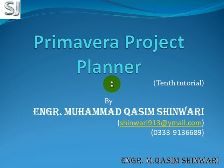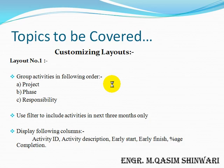Bismillahirrahmanirrahim, Assalamu Alaikum. Welcome to Primavera Project Planner 10th tutorial. I am Engineer Muhammad Kasim Shanwari to guide you. In this tutorial we will customize the layouts. We will make two layouts. In the first layout we have to group the activities in the following order: project, phase, and responsibility. We will apply a filter to show the next three activities in the next three months only, and we will also format the columns to display only activity ID, activity description, early start, early finish, and percentage completion. So let's start.